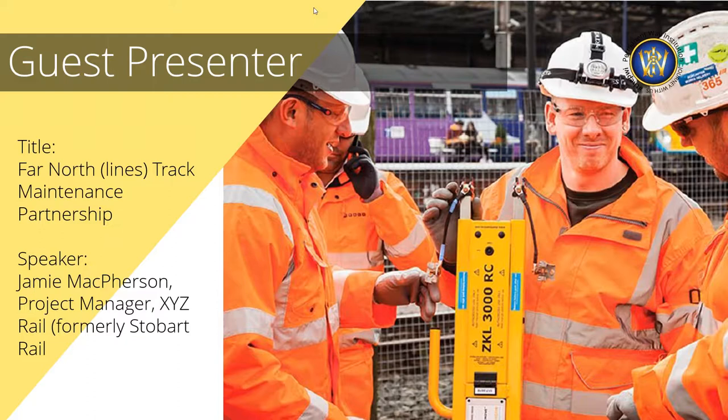And in year one, we had three work sites every night. So that's three different areas along that 250-mile route. So you're constantly having issues, or you're having a plan in case something went wrong, or in case something happened differently to what was planned. And I think it was more that kind of supervision of three different work sites. Year two, we went down to two work sites, and then year three, we went down to one work site.